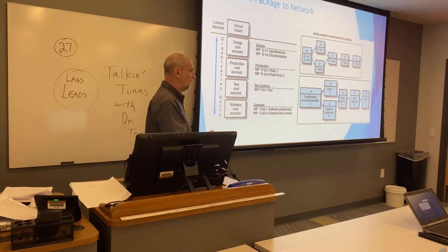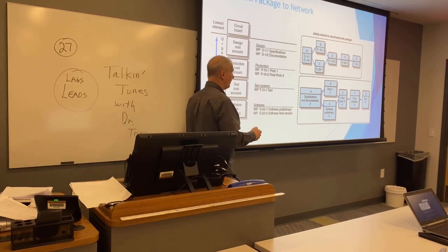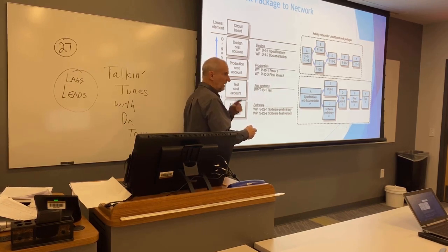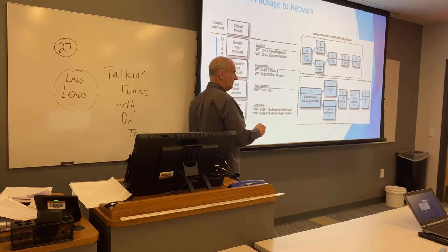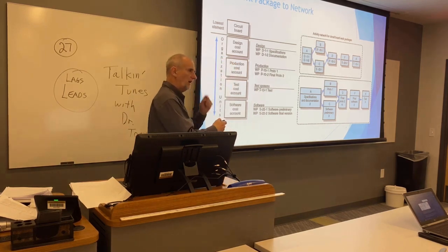Now this one takes 1 day. Okay, this starts and finishes on Monday. This starts on Tuesday, finishes on Wednesday. When can this start? Thursday. You with me? Now, here's what I'm getting at. This takes 1 day. I can start this on Tuesday. If I start this on Tuesday, nothing's happening on Wednesday, right? Because it only took 1 day.